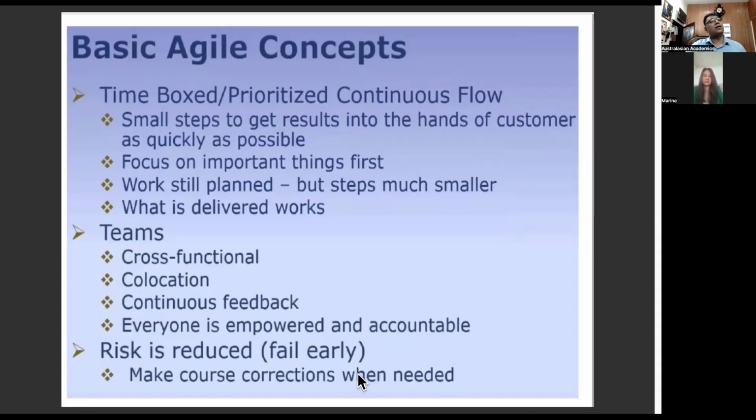For example, if you've got a sewerage system or the HVAC system wrong, or it's not done to the design that's previously planned, and you've gone through 10 floors in a building, right? You're not going to knock down those 10 floors and try and reconstruct it, right? So you do the first floor, you see if it's functional, then you move on to the second one, and then you move on to the third one, right, Marina? So that way your risk is reduced.